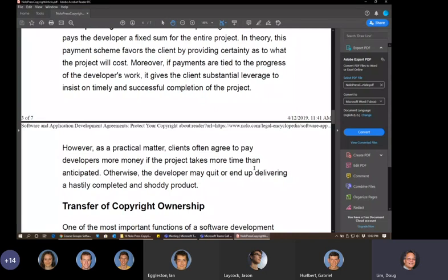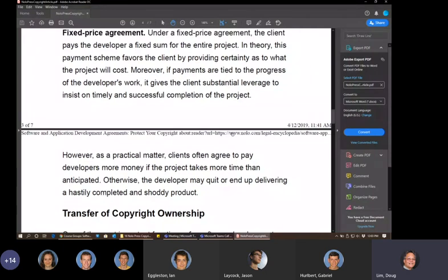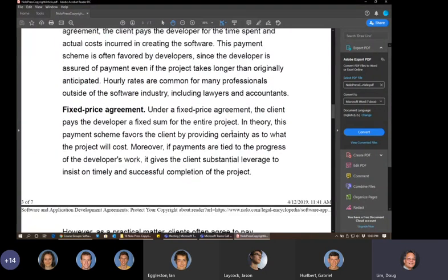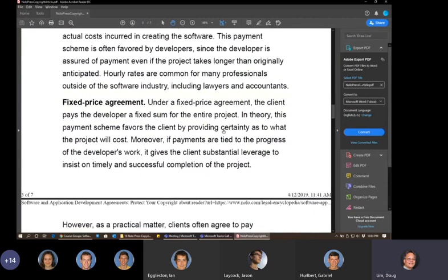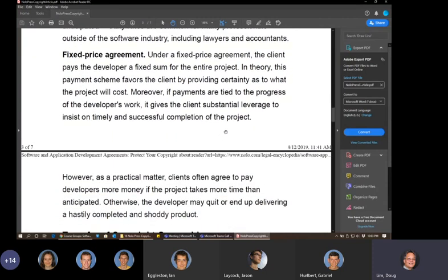So that was what I was talking about in terms of some advantages of the time and materials agreement. Here, you could possibly have a hybrid agreement that says, okay, this is the course of action that will happen if it goes over the allotted time. Or if you've run over the allotted time, another agreement could be created that says, we still want the software.